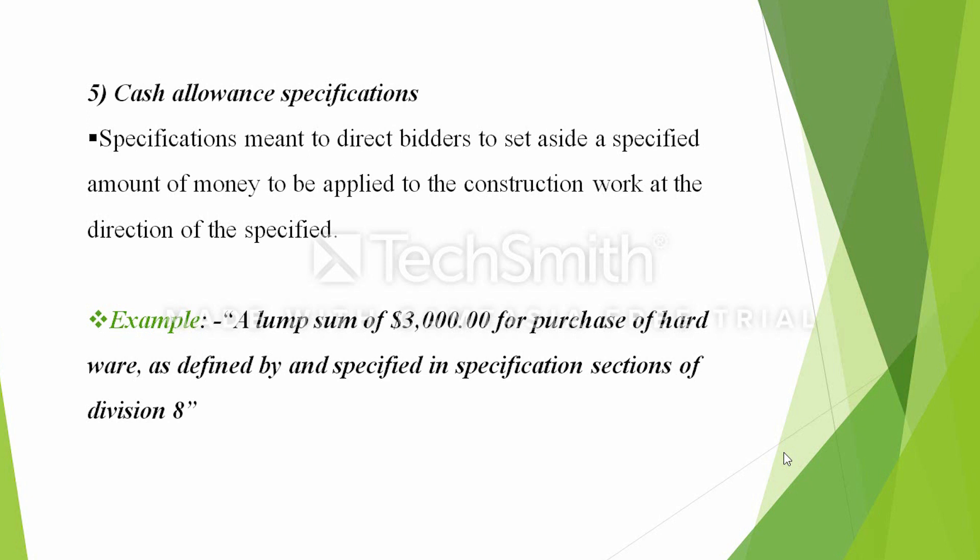There is a fair amount of detail about the descriptive specifications. If you have a cash allowance specification, it directs the bidders to set aside a specified amount of money to be applied to the construction work at the direction of the specifier. For example, a lump sum of $3,000 for the purchase of hardware as defined and specified in the specification section of division 80.